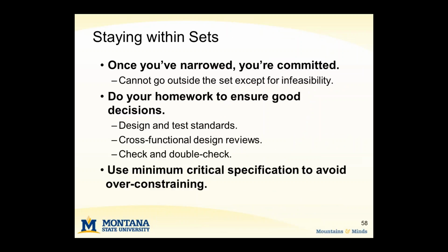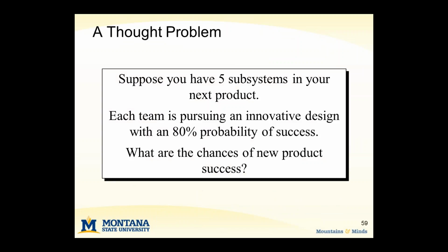Once you've narrowed, you want to do everything you can to stay within the set. So make sure that you do your homework to ensure good decisions through cross-functional design reviews, comparison against design standards, and doing double checks. And also try not to specify more than you need to, to avoid over-constraining your design space.